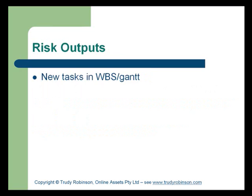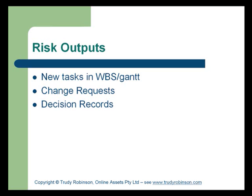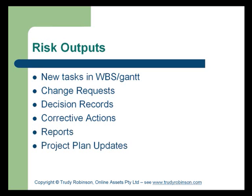The outputs from risk management: there will always be new tasks added into the work breakdown structure and Gantt chart. It may introduce change requests, which will be covered in the communications subject. The risk register will be updated on an ongoing basis as part of the project management strategy.